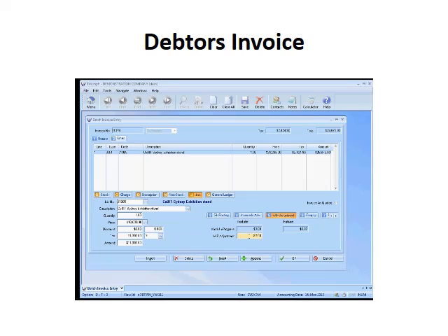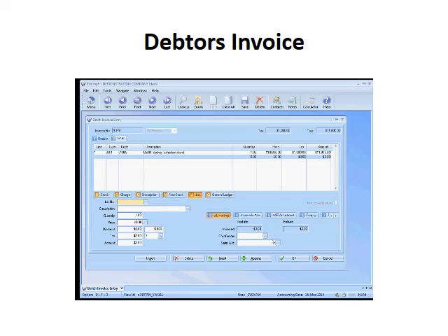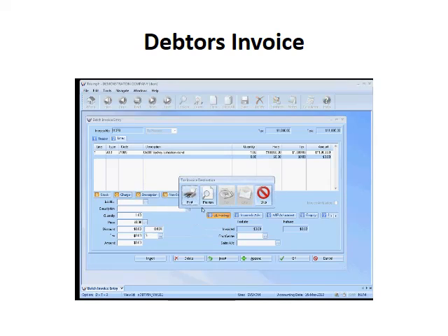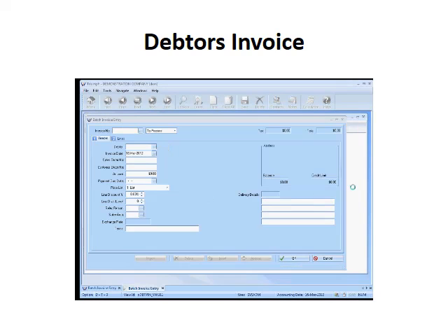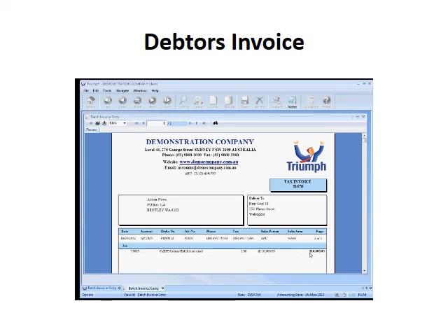For a majority of clients, I tend to say, yes, let's just work out what your standard GP is. So in this case, it's going to have a 20% GP. So I'm always going to write off the related 20% in here on my WIP adjustment. That's just a rule on this example. So I can process that through. If I process that one and now have a look at that transaction, it's a very simple invoice, all the other details are gone. It's now just a progress claim, very much a progress claim, and the WIP is based on the progress.